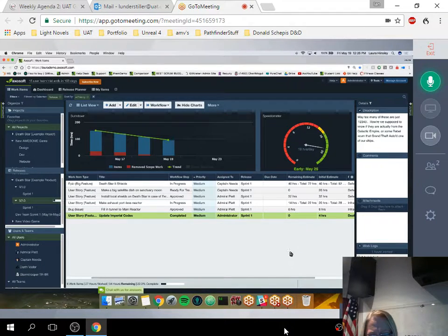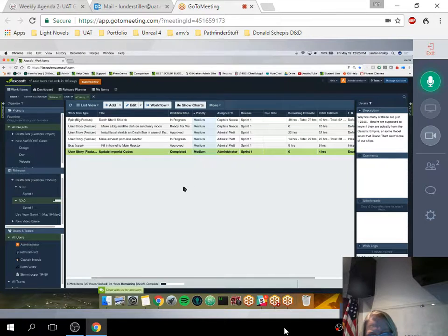I think work logs are definitely the way to go for better reporting. And also we have a dashboard widget that's estimated versus actual. So when you add those work logs, it's filling in an actual duration field, and you can look back on the dashboard widget and say, wow, our estimates are way lower than our actuals, or maybe it's the inverse, and that can help you make better decisions when you're adding new design items or development items, and whether or not you're estimating accurately.